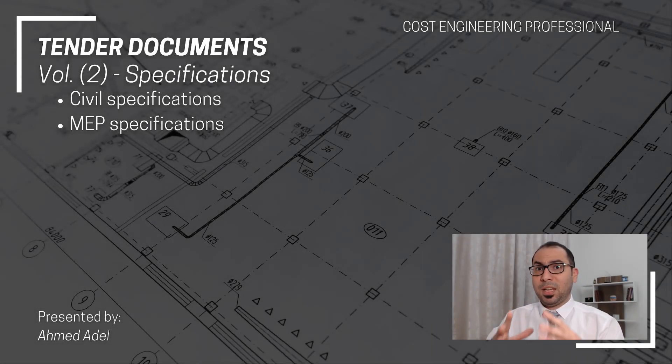Volume two is the specifications of the project. You will find the civil specifications and the MEP specifications. These will be very large files that include everything related to the materials and their specifications that you are going to be using in the project — the warranties required for each material, how the material should be applied, and even the required experience of the subcontractor. For example, the specifications might state that a waterproofing company must have been in the market for the last five years or more, so you cannot bring a new company for that work. Tests that should be done on the materials are also covered in the specifications.